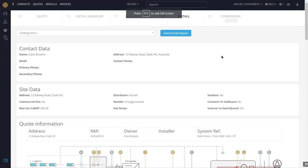Now moving on to the install and commissioning area. After you've won the job, you've got your install page, which you can email or download as a PDF. This is great for when you're on site — it contains the line diagram. Because I entered a lot of information in my system design page — like my protection devices — they are listed here as well. My DC voltage drop, AC voltage rise, system details, and the line diagram are all included. This goes into the system manual for the customer.